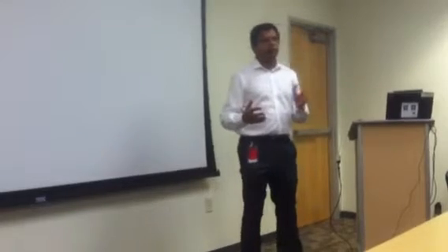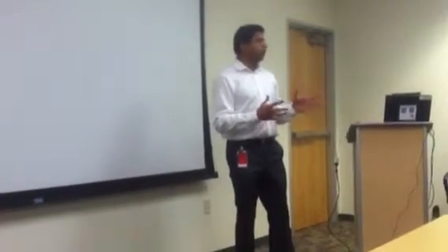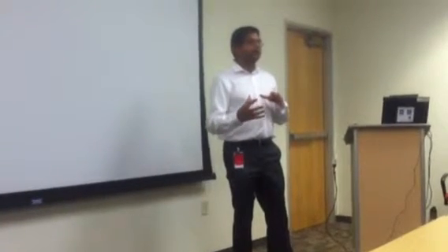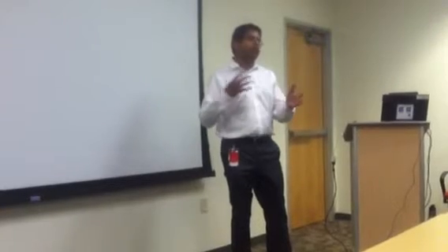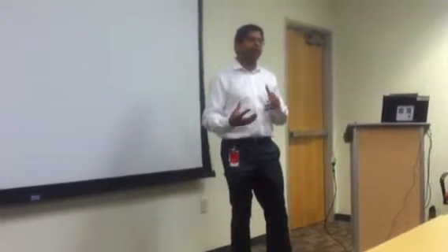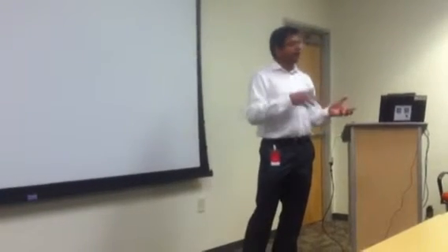So here is how we planned. We developed the initial components that are required, like the web services and the UX, first, and we ensured that the Android development lagged one sprint behind the iOS development. That way we were able to apply the lessons learned from iOS to Android.